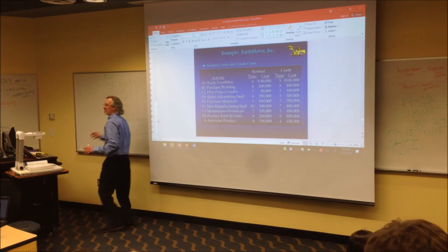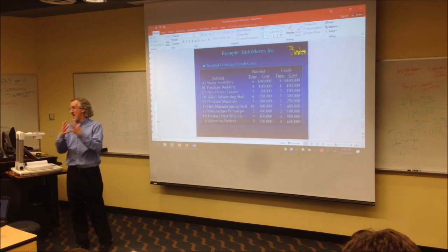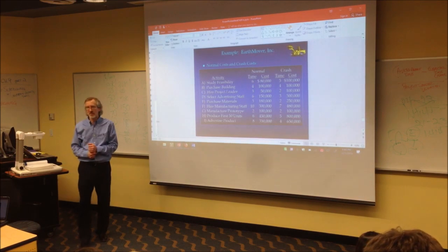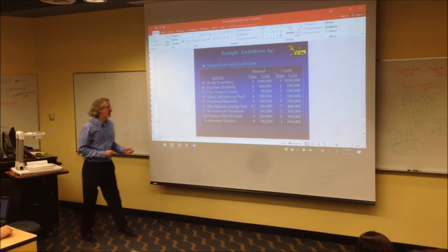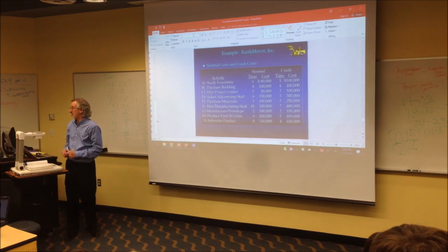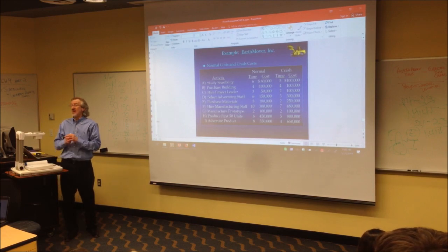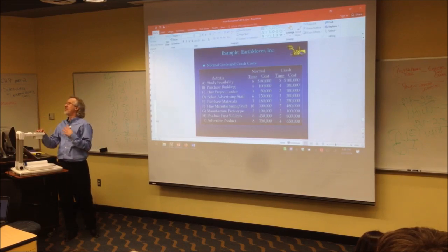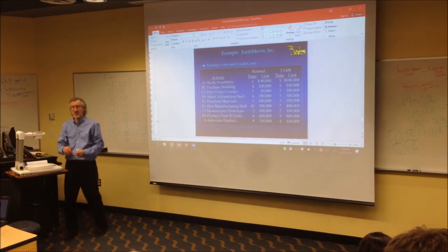Now, here's what's happening. In crashing, you have to have a variable for every activity called an X variable, just like we've used before. How many X variables do you see? Because there's 9 activities. So we have X sub A, X sub B, X sub C, right? All the way down. And then you need a Y variable for every activity. So we have how many more variables? 9. Y sub A, Y sub B. Everybody get it? The X variables and the Y variables. The Y variables are the amount of the activity that will be crashed. Y represents how much it can be crashed.